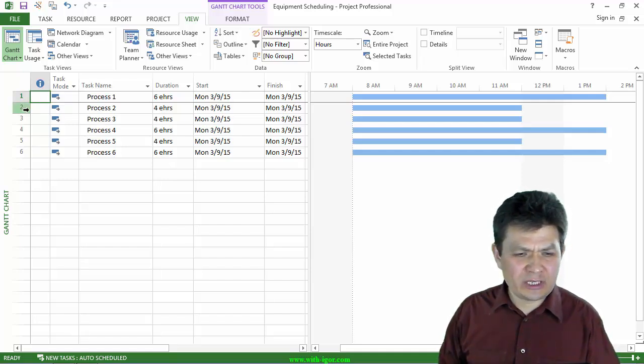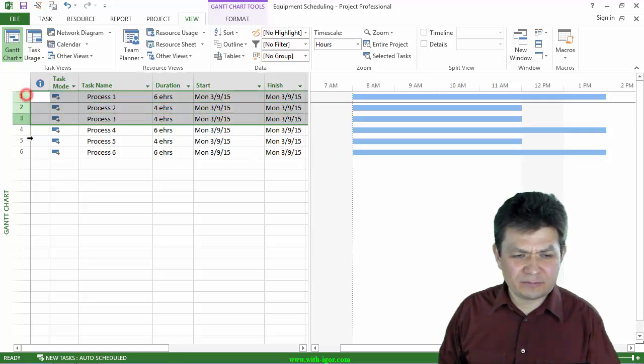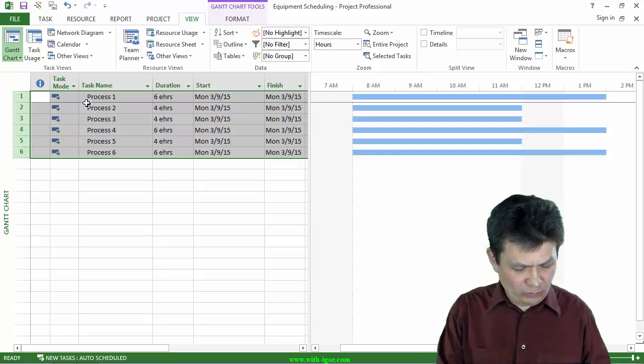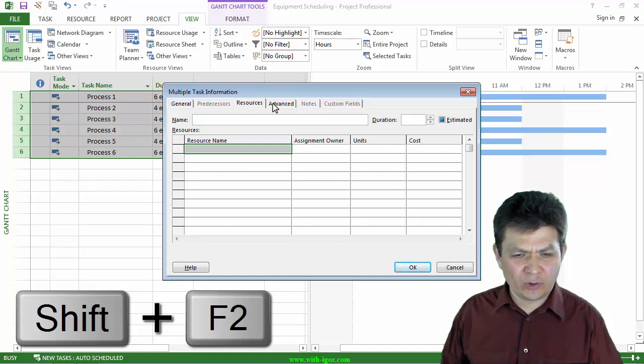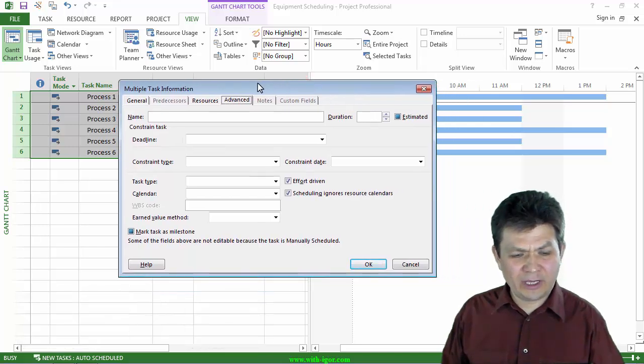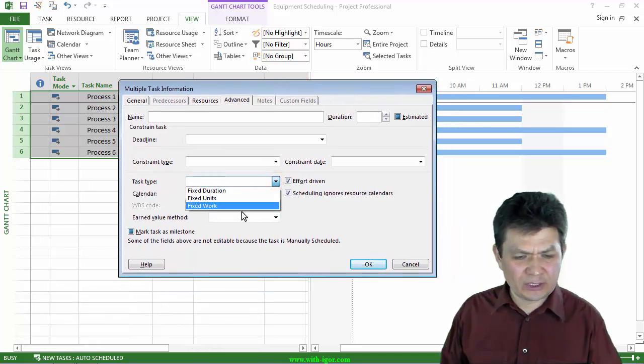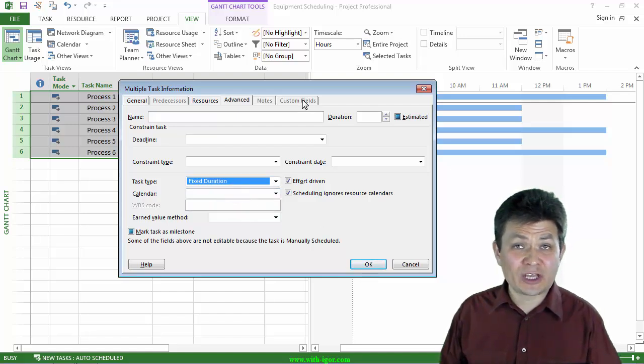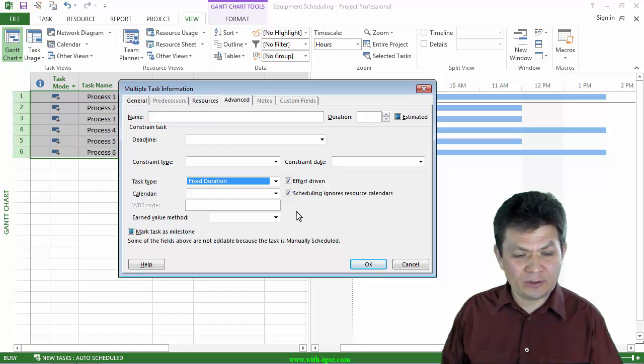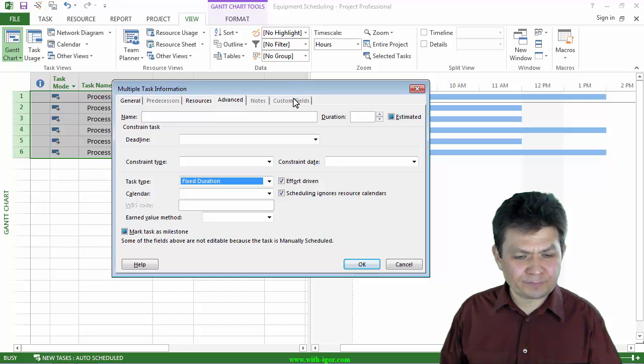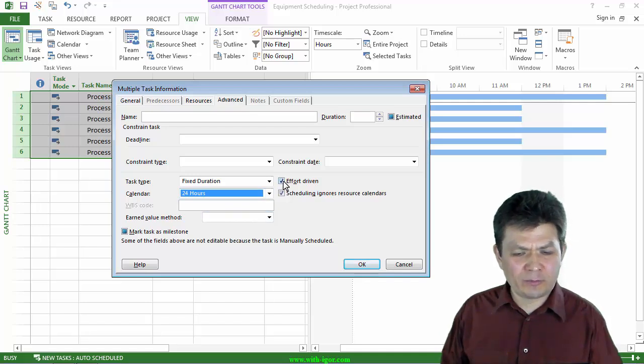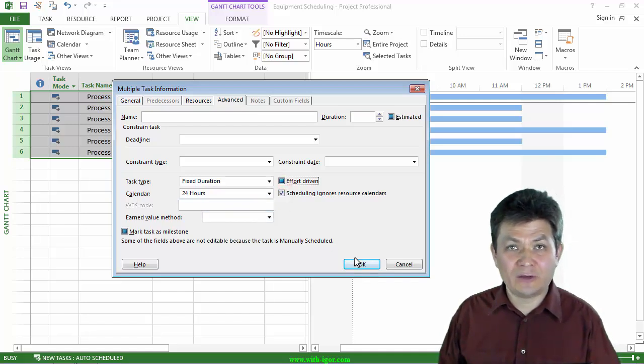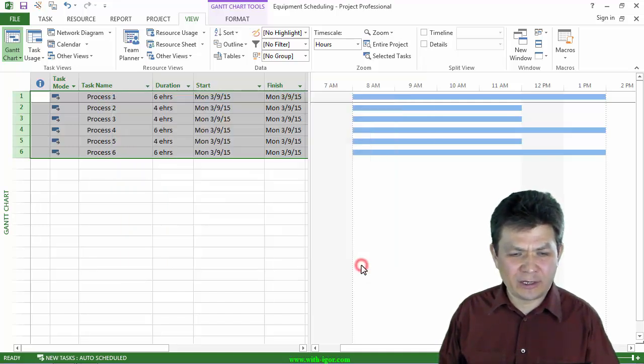I want to do a couple more things here just to play it safe. I'm going to select all of them and go to task information dialog box. I will click on the advanced tab and choose the task type as fixed duration just in case. Of course, elapsed hours will already make it fixed duration for me, but I will do that anyway. Another thing I would like to do here, I would assign a 24 hour calendar to the task instead of none. And I will make them non-effort driven. I don't really like the effort driven scheduling option anyway. So I'm going to click OK now.